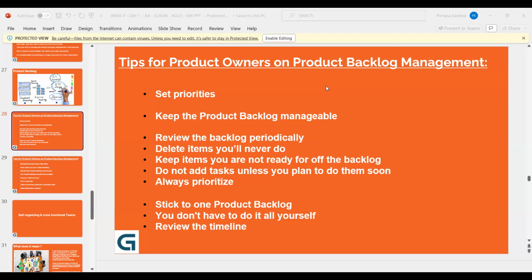Wherever you find that in a backlog item, like in user stories, the details are not yet added and your stakeholders, vendors or team cannot understand it, it is not yet ready. If some information is still missing from the customer, let's not add it into the sprint backlog meeting until it is ready.